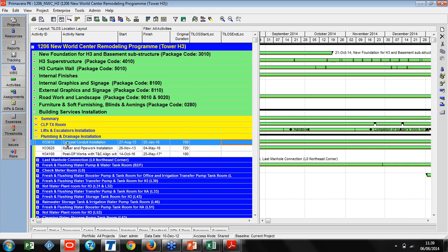This is one of the high-rise building projects, and we will just put which activity is on which level. For example, this one, installation works from 0 to 50 meters. So it represents that. And when we put this information, it will take the start date, finish date, as well as the start distance and end distance locational information. This is how we can represent it.